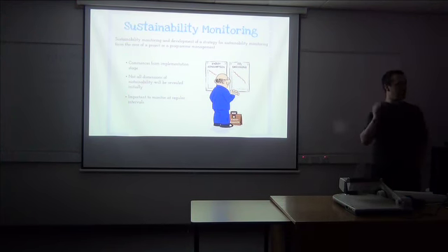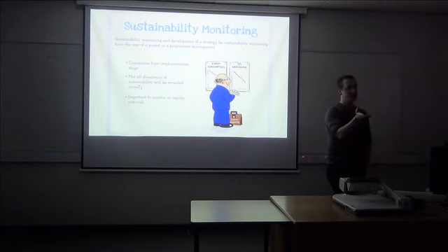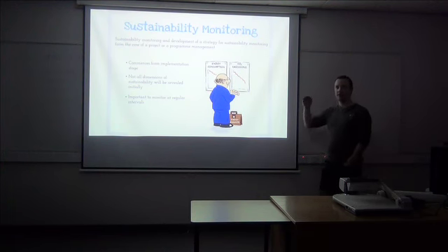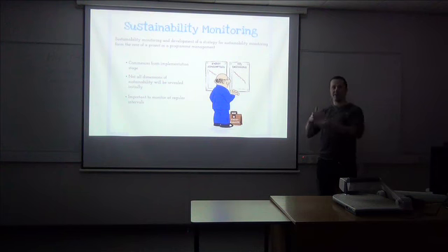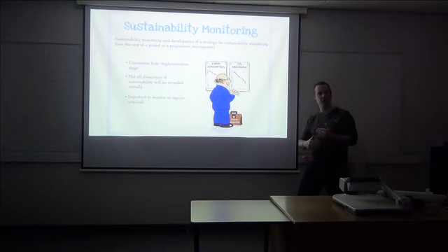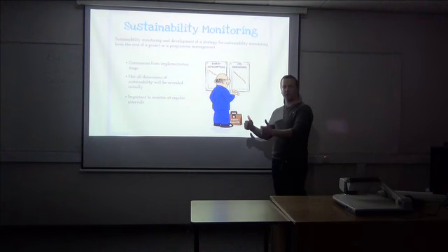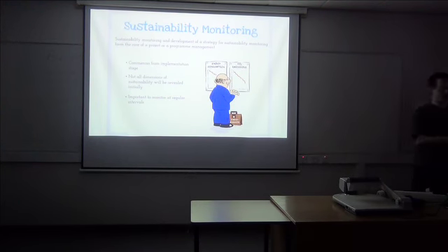Some project management bodies of knowledge and some governance processes, such as PRINCE2, for instance, will have things like gateways built in, hard built in. So in a certain amount of weeks you have to pass a gateway. So you have to stop, evaluate, monitor, get that signed off before you can actually move on and carry on with the project. So if you're using a specific methodology, sometimes that will help you.